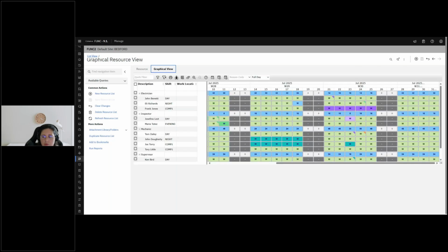I can open the list of people that I manage, and then I can see all of their projected time off and the various reason codes associated with resources impacting my schedule. This list is organized by craft and then by resource name. I can again view the total available hours by craft in the blue summary line. The other tiles will show W for working day. Grayed out boxes are for when people are off shift.